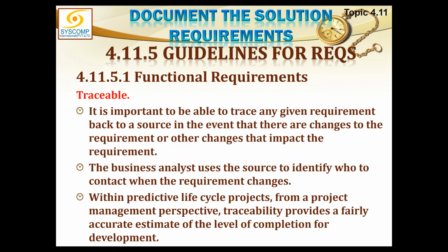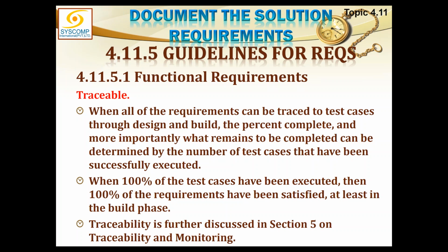From a project management perspective, traceability provides a fair, accurate estimate of the level of completion for development, when all the requirements can be traced to test cases. Test case, what is it? This is the last check to see if the requirement has been met and passes the test. So every requirement must have a test case. It should be traceable to the test case through design and build, and more importantly, what remains to be completed can be determined by the number of test cases that have been successfully executed.